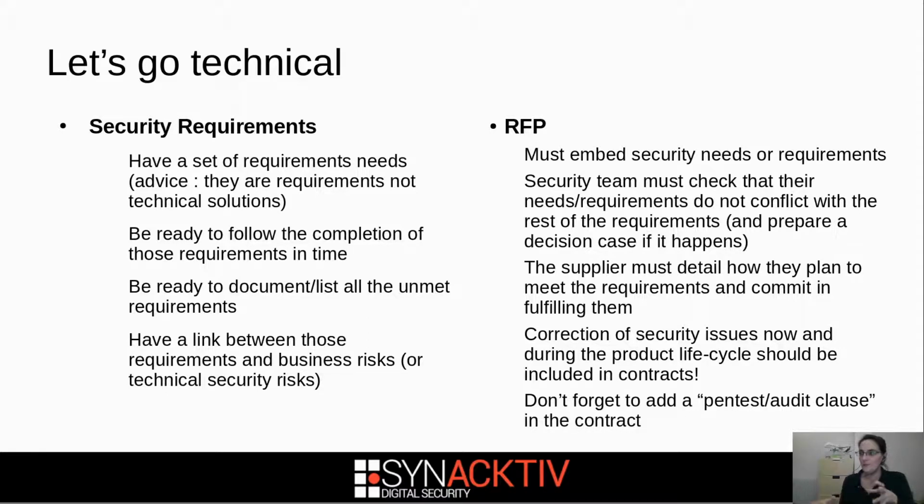So if you have a device which is supposed to be connected to the internet and the security requirement is no internet connection, you have an issue. So you should make sure it doesn't happen, and if there is a conflict, you should prepare what we call a decision case, and we'll talk about that later. And you should have resolved all conflicts before the RFP.